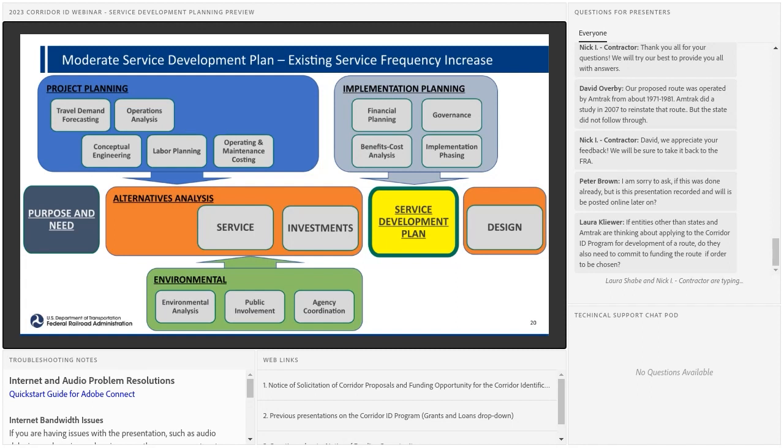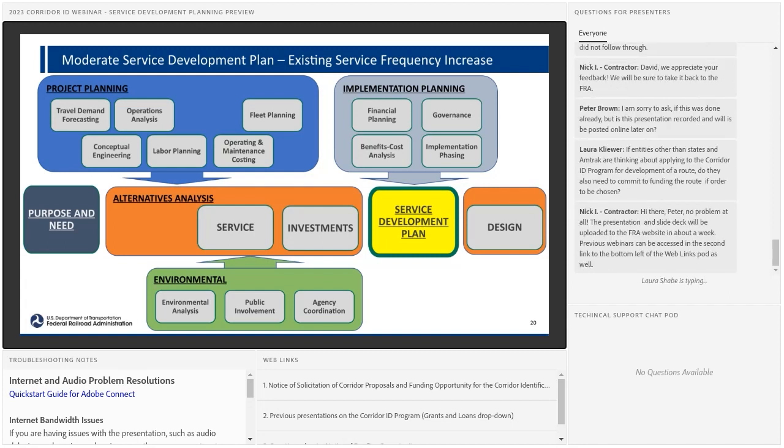Station and access planning might actually not be a major component of this if you have good stations as it stands right now, with adequate capacity to fulfill the needs of any additional ridership that you're anticipating would result from the frequency increase. You will have fleet planning come back in though. Your equipment turns are going to change. Your fleet needs in terms of the amount of equipment you need may change. So that comes back into play.